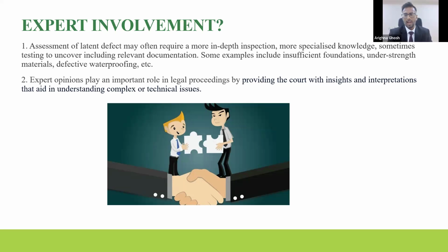Okay, I'll answer the question in two parts. First, what kind of documents are required to maintain so that it becomes easier if a claim is to be developed at a later date? Like I said a while back, the first and foremost, most important document will be a root cause analysis. It is very essential for whichever party, whether it's a contractor or the employer, that the moment a defect is notified or observed at site, the first step is they perform a root cause analysis: why the defect occurred and what has led to that defect coming up.